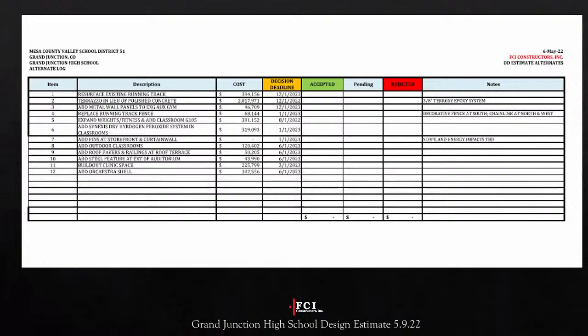I guess projected timeline. Where are we in relation to that? Are we pretty close to where we hope we'd be? We're right on schedule. So we've got the helical pier guy on board. He's doing a test pile this week again, just to do some confirmation. And then that material is waiting for us. So as soon as we place the order, we'll see it. And we're expecting to start at the end of June putting in deep foundation.